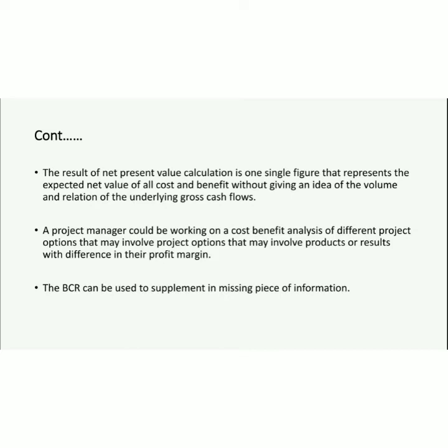Further, the result of a net present value calculation is one single figure that represents the expected net value of all costs and benefits, without giving an idea of the volume and relation of the underlying gross cash flows. A project manager could be working on a benefit analysis of different project options that may involve products with differences in their profit margin. The benefit cost ratio can also be used to supplement that missing piece of information. Representing the ratio of discounted benefits to discounted cost, it is a relative measure.